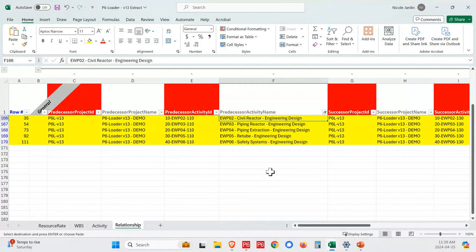Okay, so they did the first template, and they might have had stuff start to start. And then they said, no, it should be finish to start. And then they said, oh, no, it should be start to start with a lag. So we changed logic a lot. So we were able to do these edits very quickly. And that was the benefit there to adding these fields, okay?